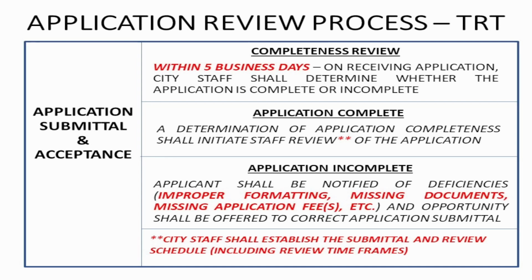So within 5 business days of us receiving the application, we're required to review it to make sure all of the documents that are necessary for review have been provided, all the associated fees, and the formatting of the application is correct. Once we've been able to review that for completeness and determine that it can proceed to the staff review, then that initiates the cycle where the technical review team gets involved.